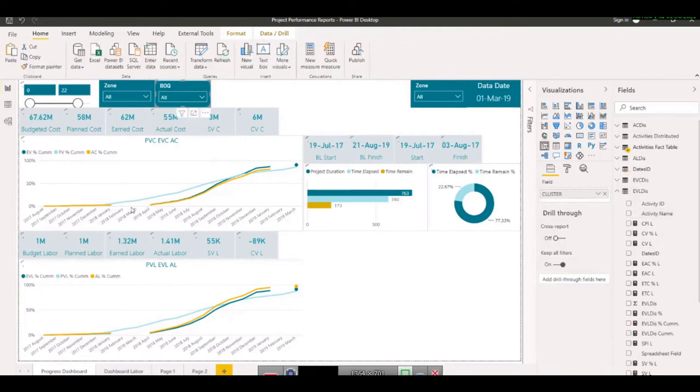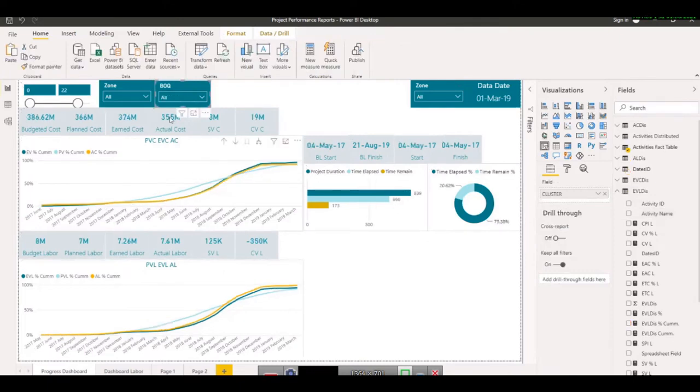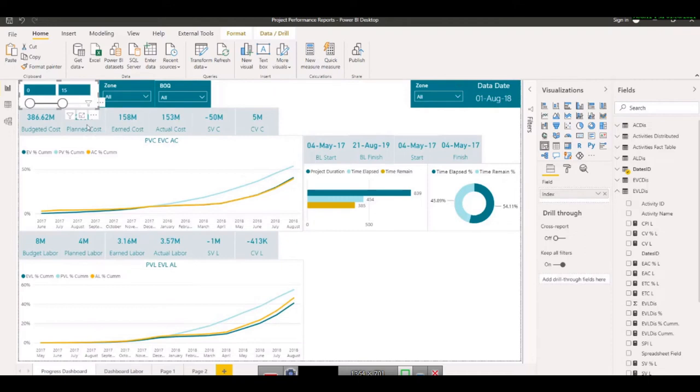Now it will show a smooth line because something happened here, all the filters are selected. So far this is the situation. So in case we want to bring the delay, there are two options. You can bring delay from total float as well, but it will not be a dynamic delay from a time point of view. If you change the time, data is changing, but total float will not be changed because total float is changing after CPM logic.